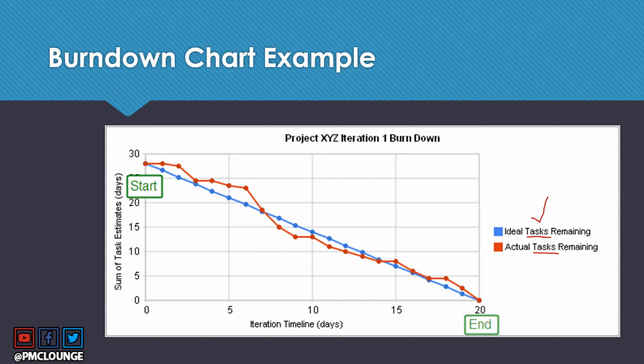These are basically tasks that your engineering team has estimated the features or the functionalities of your project that needs to be delivered. Now, the total number of these tasks or total number of these stories, if you're coming from Jira world, so the total number of stories, story points, or tasks, this total number is basically the starting number on your y-axis.